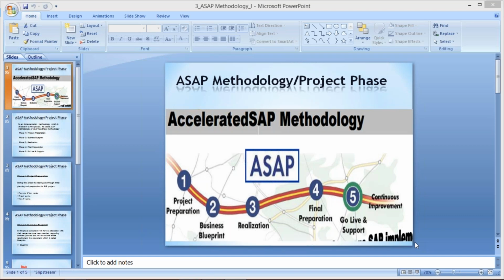As I said yesterday, if the client says, okay, you have to implement this project within 8 months, this is the deadline. So when is this deadline going to start? The client will say that the moment you recruit your project manager and once he reaches our location, our countdown will begin. It means from that day onwards, we are going to count our 8 months. So the moment the project manager reaches the client location, what will happen?